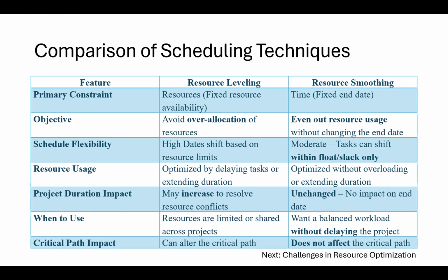Project duration impact. You can extend the deadline for resource leveling, but you cannot change the end date if you're using resource smoothing. When to use? Use resource leveling when the resources are limited. Use resource smoothing when you want to keep an eye on that due date. No extensions are granted.